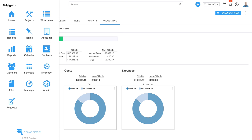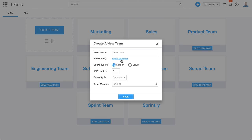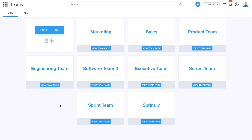Let's kind of shift and move over to teams. You can create teams on Ravetree, and each team can set up their own custom workflow. You have the option to create either Kanban teams or Scrum teams — those are just two different types of agile workflows. You can think of a Kanban approach as more of a continuous workflow approach. Scrum is if you're doing sprints — a lot of people like doing two-week or three-week sprints to manage their work. You can put in your work-in-progress limit if you're doing a Kanban approach, or you can put in capacity. You can also specify the team members.